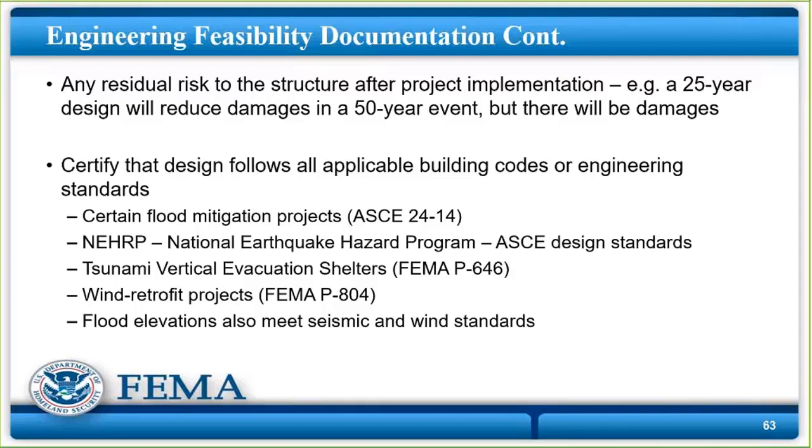And then just which standard, which building code, which engineering design they are using. The engineers are usually pretty good about that, so I'm not concerned about that, but I've had problems with the National Technical Review Team pushing back on projects that we knew were going to be required to be built to the Washington State Building Code, but they didn't know anything about it, and they didn't know if this county had adopted it, because guess what? There are tons of counties, millions of people in the Midwest, that are not covered by building codes. So even though there might be a state of Iowa building code, not everybody adopted it. And so they were saying, we don't know, you have to tell us. We didn't even know to ask that of our states.